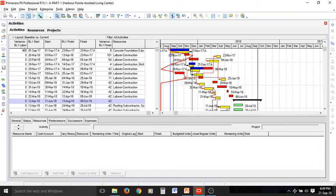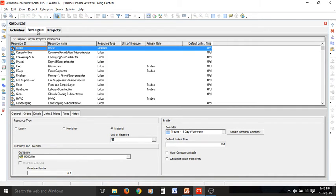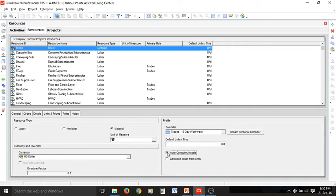Another important thing is about auto computing actuals for non-labor resources. If we go to the resource page, here is the list of resources for our current project — many of them are non-labor. We can use this option in Primavera P6 by going to the detailed tab of the resource page. On the right-hand side we have auto compute actuals — selecting this option enables automatic computation of actuals for non-labor resources and saves time, because we don't need to change values for material resources one by one.